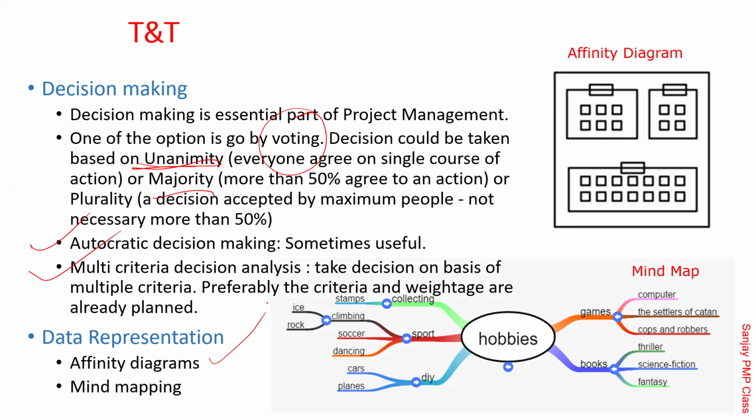Once all those chits come in, the facilitator will use a whiteboard and create multiple groups. He will say that these are the requirements related to safety of the product. This is going to optimize the cost. It is going to reduce the cost of the product. This is going to improve the look and feel of the product. The requirements falling into the appropriate group will be pasted there. So basically, an affinity diagram allows you to group randomly generated ideas.